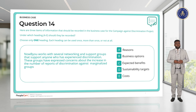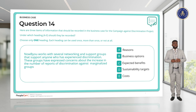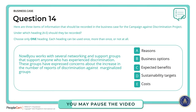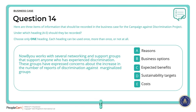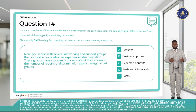Question 14. Now Be You works with several networking and support groups that support anyone who has experienced discrimination. These groups have expressed concern about the increase in the number of reports of discrimination against marginalised groups. Under what heading would we put this? This is the Reason — it is one of the justifications for why the project was started. Answer A is correct.